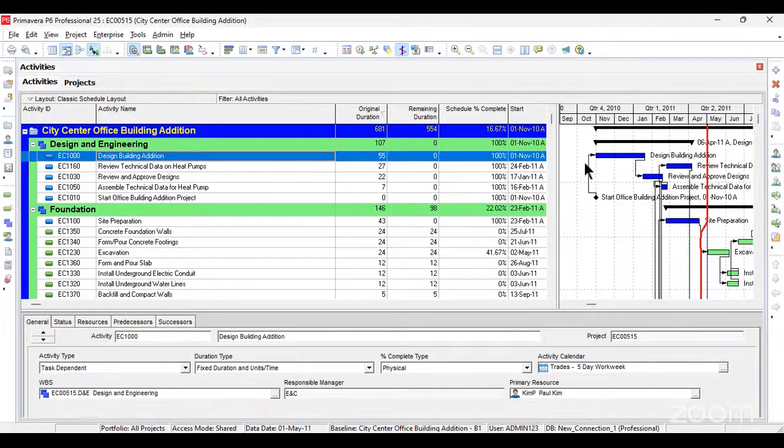Apart from equipment that you know are on lease, they are charged per day. For those kinds of equipment, you make sure that it is on ground a day before that time, and maybe make a commitment fee to whoever you are hiring it from. Because a delay in those activities, you won't keep maybe your engineer on ground a whole day, then tell him he should go back to his house because people didn't work. So a delay will definitely delay your entire project. You are going to waste money and resources.